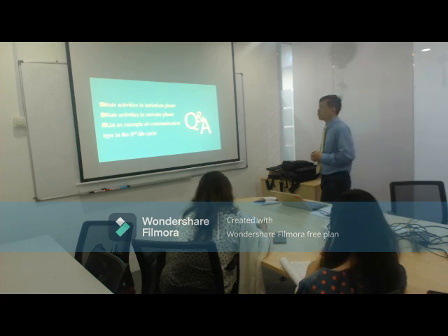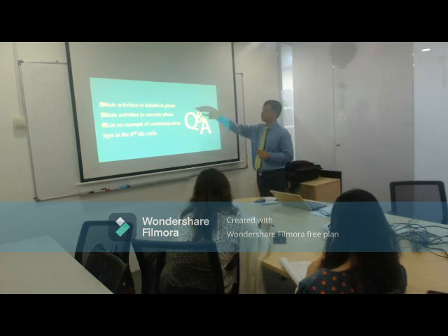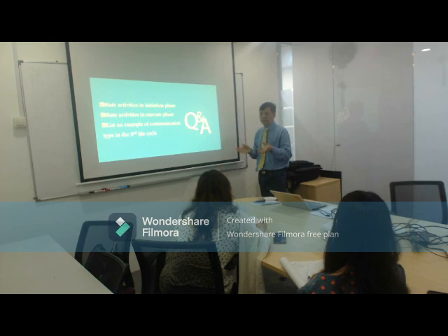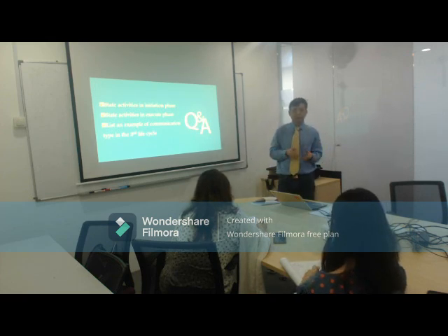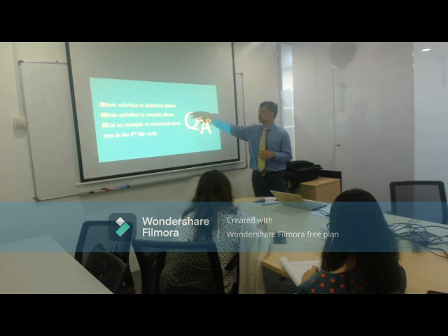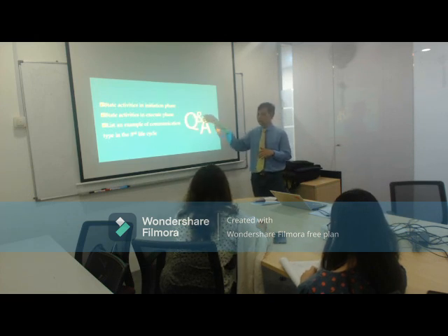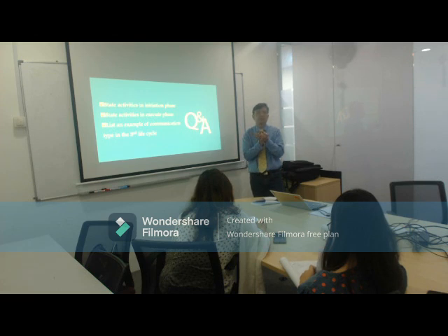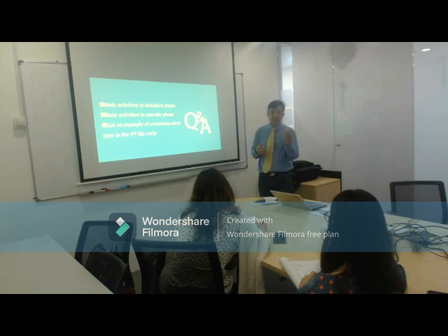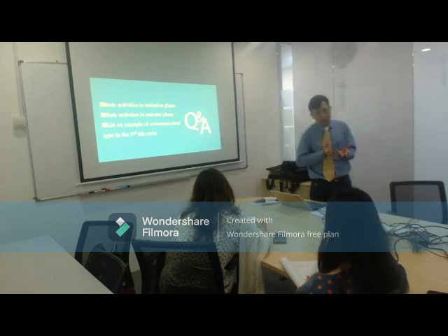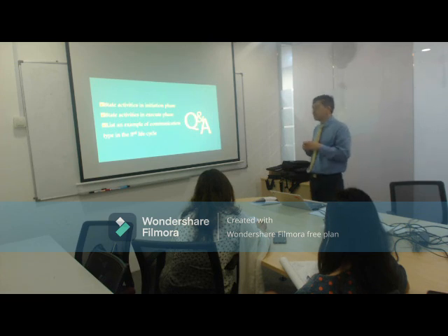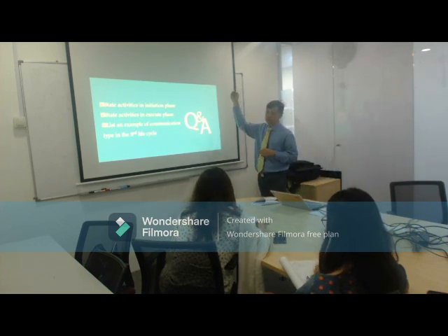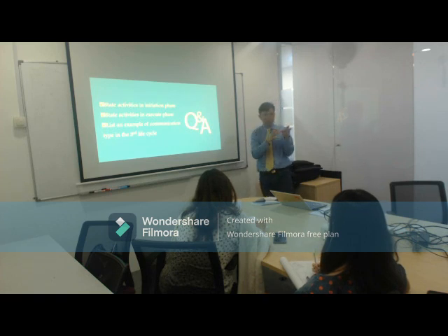In some large organizations, when they execute phase, it will involve regular weekly meetings with everyone for their updates. Some people will have regular sub-committee meetings, so each sub-committee must have a meeting every week. At the end of the month, they have the meeting with the steering committee. Steering committee will be those people involved in the management. The sub-committees are all the small groups of people doing small activities. They will report back to the steering committee.